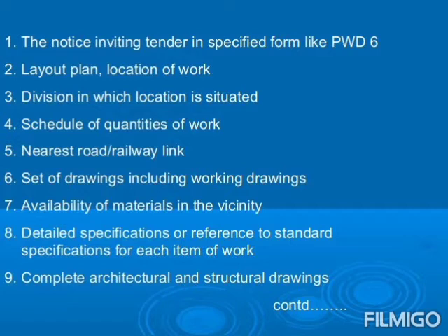Number five, nearest road or railway link. Number six, set of drawings including working drawings. Number seven, availability of materials in the vicinity. Number eight, detailed specifications or reference to standard specifications for each item of work. Number 9. Complete architectural and structural drawings.